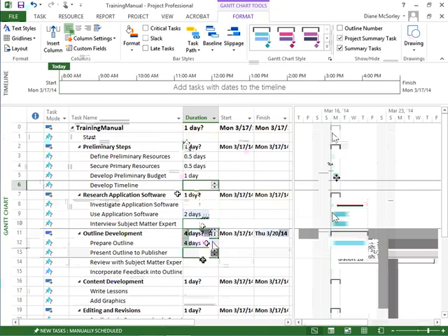0 days, and the Gantt shows me a little diamond. That's the milestone marker, and it puts the date in. So it's just a marker, just an indicator for you. And like I say, use it at the beginning and the end of the project, or the beginning and the end of phases. Completely up to you when you have something you want to include in the plan, but it's not really a task. You can enter it as a milestone.